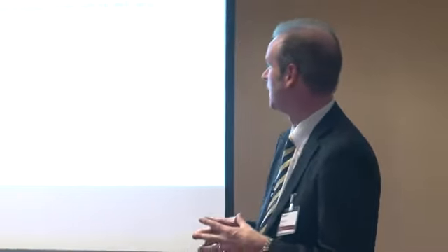Records generally. Okay, so I've been talking about the programme, but records generally, whatever they might be, so I could be talking about variations here or just delays, schedules, etc. Again, they need to provide or allow a comparison of what would have happened with what actually did happen. Forensic delay analysis is all about measuring change. And there might be some contractual requirements. They need to be expressed by reference to the programme.